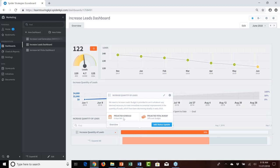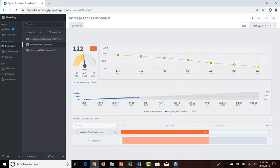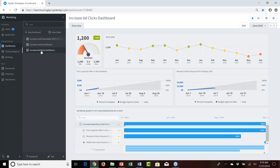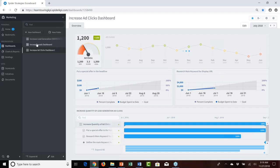Clicking on the Gantt chart bar shows that compared to the projected schedule we're going to be about six days late and projected to be a little over budget at current performance. This is a nice consolidation of both scorecard items and initiatives on one dashboard. The increase ad clicks dashboard similarly shows ad clicks performance over time and visibility into the tasks: put a special offer in the headline, and research the main keyword for display URL.